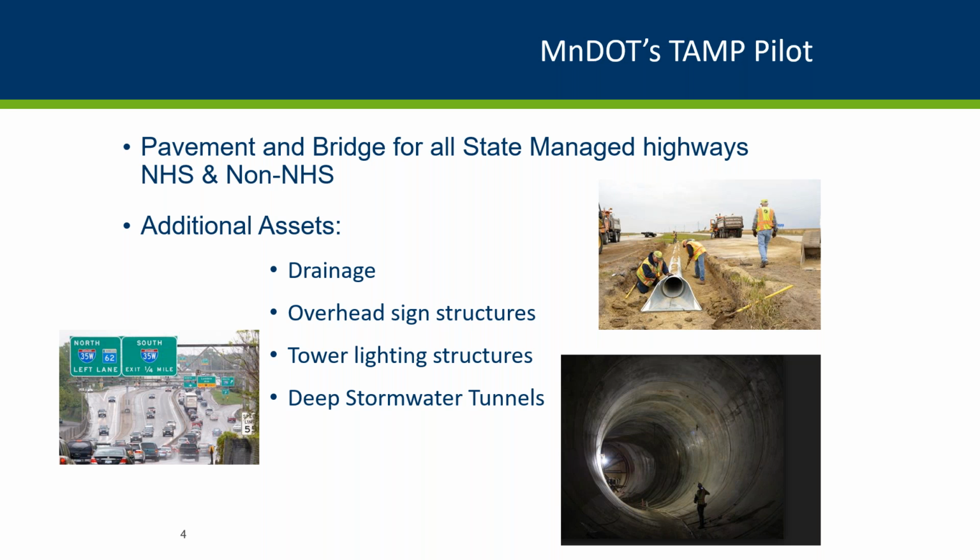MnDOT is a joint owner with the city of Minneapolis. We have many miles of those things. They're 16 feet or so in diameter and about 100 feet below ground in sandstone layers. And again, that was an asset that we had not as good a knowledge of as we wish we had, and some concern about the risks. So all these assets we basically ran through the TAMP process of reviewing inventory and performance targets, risk assessment, life cycle costs, performance gaps, all that sort of thing. And then used teams of experts, which is, I think, another point I will make later on in the presentation.